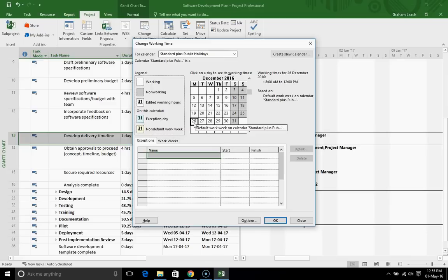So, a number of ways of doing it. One of the easiest: you select your day here, which is the public holiday. It's Boxing Day. So we go down here, we're going to give it a name, and we can say Christmas break. That's how we're going to describe this. Click on Start. Okay, so starting on the 26th, finishing on the 26th. Most public holidays are just one day in duration, but obviously the Christmas break is generally Christmas Day and Boxing Day, 2 consecutive days, and that is the case in December 2016. So we're going to say the start date is the 26th, but the finish is the 27th. Click on Details.